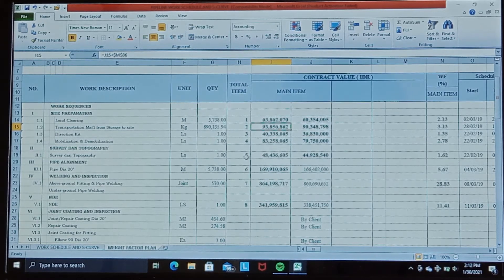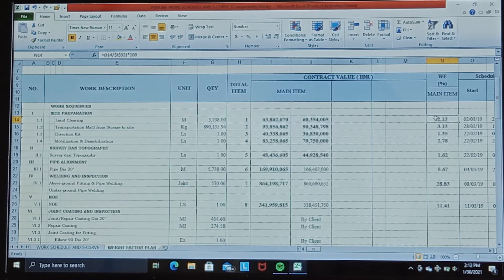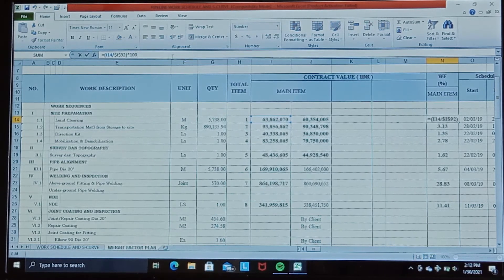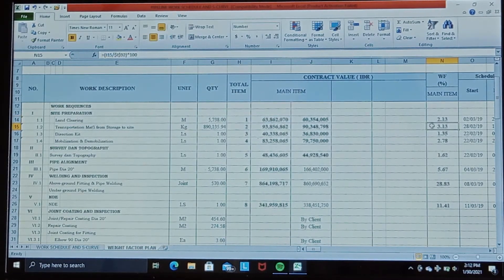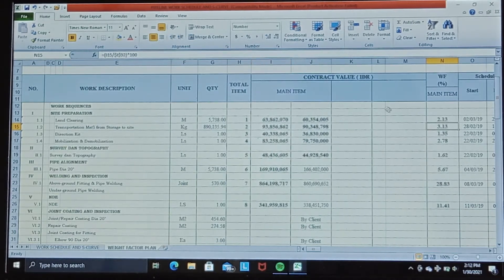Then we determine the weight factor for each direct work. The weight factor is calculated by dividing the total price of each direct work item by the total contract price, then multiplying by 100. You can check the formula in each cell. We then obtain the weight factor for each direct work item.